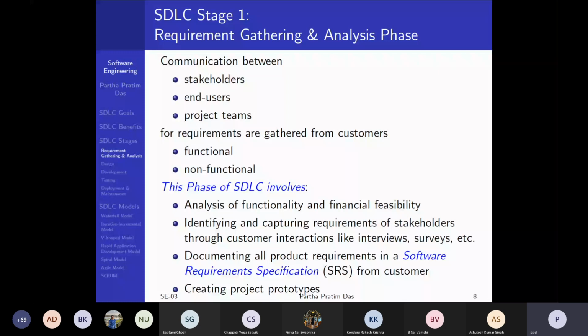For example, if you are doing say a stock trading system, then your stakeholder is your stock exchange because they are the customer. But you will also have to take into account organizations like NSDL or CDSL, who are demat depositories of the shares, dematerialized depositories of your share. You have to take the registrar of companies in the loop so that you do not make a trading system which violates the company regulations and so on. So those are the stakeholders.